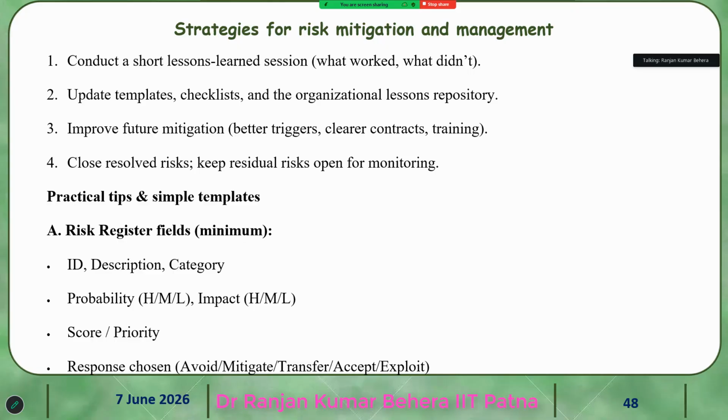And close resolved risks. When the risk is resolved, you can close that. Keep residual risk open for monitoring. Those which are residual, you can monitor that.